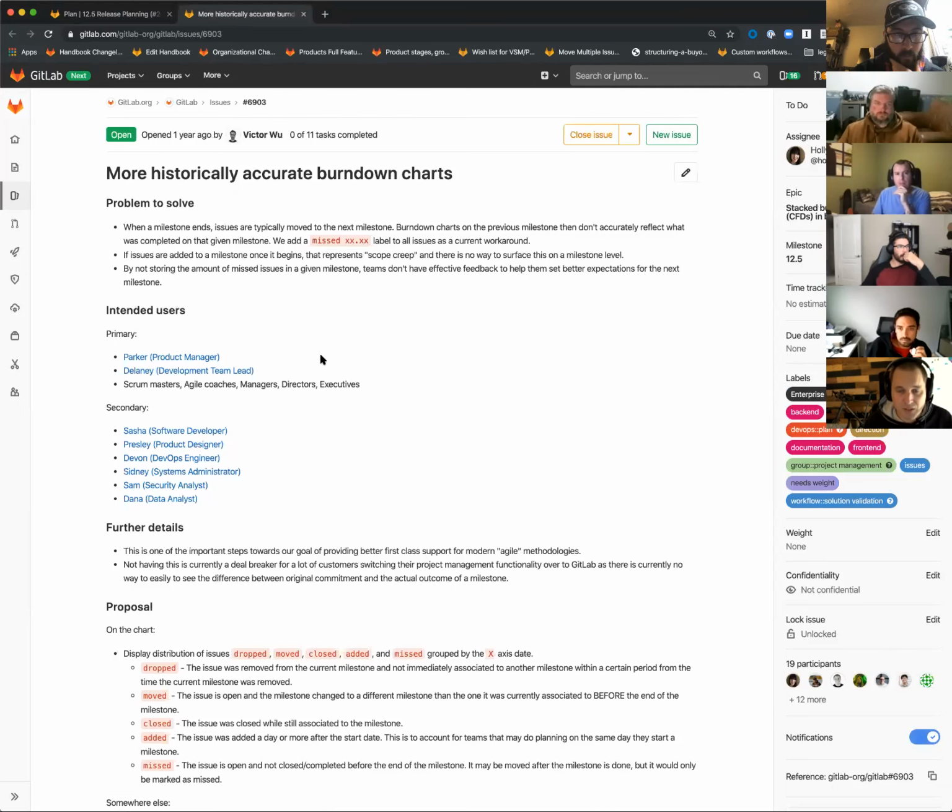So the problem is right now, when a milestone ends, issues are typically moved to the next milestone, and burndown charts on the previous milestone then don't accurately reflect what was completed on that given milestone. Well, I guess it does show what was completed, but not what wasn't completed and what got bumped to another sprint or another milestone. And so there's no way to say, we started with X, we added Y amount of scope, we removed Z amount of scope, and then we ended up with the total completion of A.